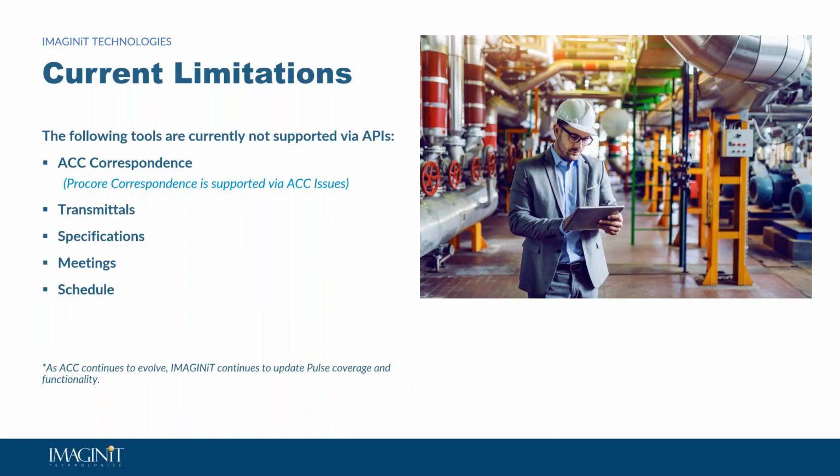The same goes for schedule. If schedules are being updated, generally that's not a huge concern because say your general contractor is in Procore, they're managing the schedule. It's really a glorified, we'll call it a viewer of the schedule, even in Procore. It's not like you can make changes to it. That's done generally through external applications like Primavera P6 or Microsoft Project.